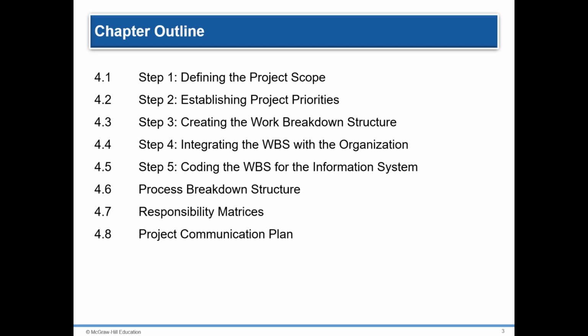Once the outline and its details are defined, an integrated information system can be deployed to schedule work and allocate budgets. This baseline information is later used for control. With the work of the project defined through the WBS, the chapter concludes with the process of creating a communication plan used to help coordinate project activities and follow progress.